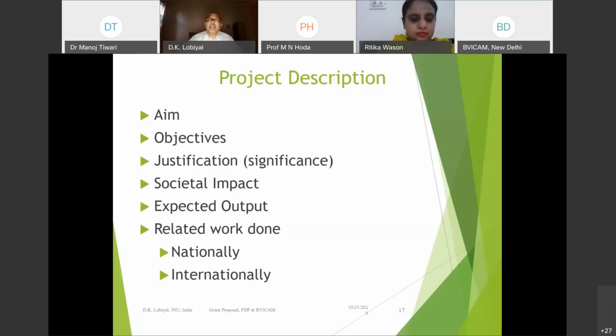Say, for example, I'm doing a project on language processing. I say, okay, I'll develop a corpus. Then I'll make a parallel corpus with 2 languages. Then this corpus will be used for machine translation. First, I'll make the corpus. A parallel corpus may take 1 year. So this is one objective, to develop a corpus, and the milestone I'll achieve is a parallel corpus of Hindi and English, for example. This objective is giving me this milestone.